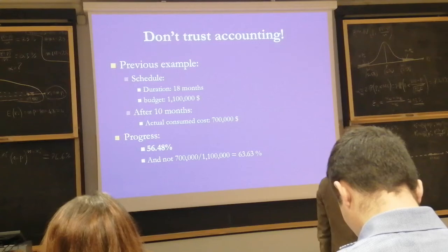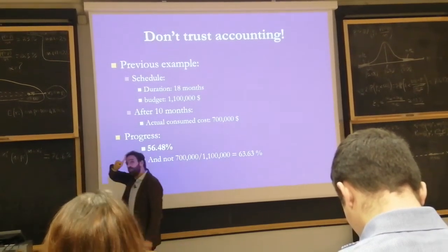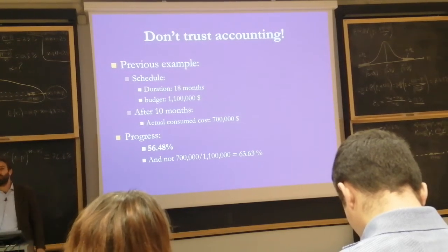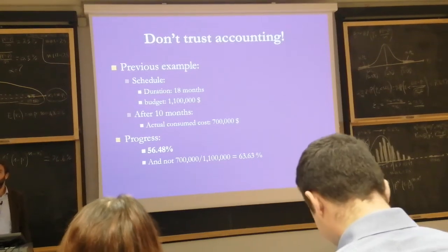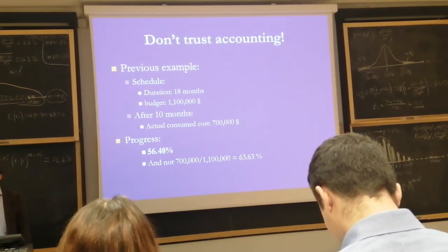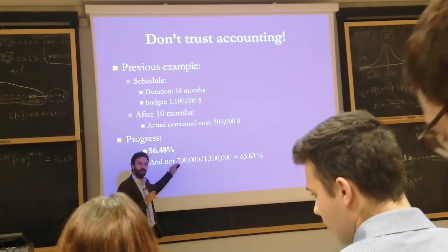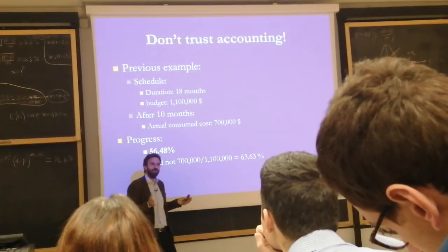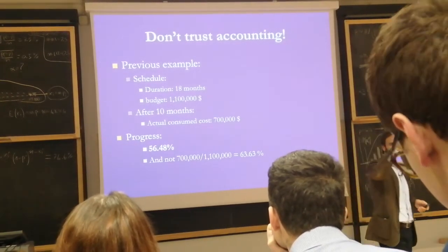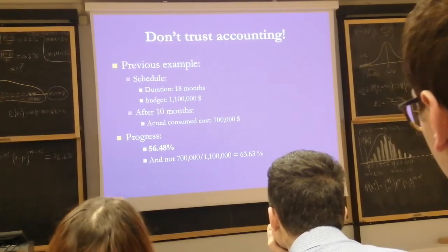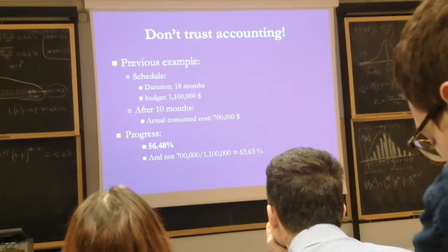Oh, okay. There's something you're missing. There's one missing information. Why don't you ask? What do you need to know? Does the word scheduled... you know that there's a missing information here, which is about the word scheduled. Because here you have the actual cost of work performed, the WP, the BAC, but you're missing the WS.